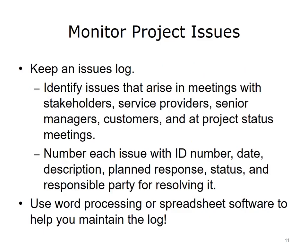As you monitor your project, an issues log can help you keep track of problems, both small and large. As you identify issues that arise in meetings with stakeholders, service providers, senior managers, customers, and at project status meetings, include them in the log. Assign each issue an ID number and include the date, description, the planned response, and the person responsible for resolving it. Update the log as the issue is resolved. You may wish to keep your log as a word processing or spreadsheet file, as these typically include sorting or other functionality that can be a great help in managing the details of various issues.